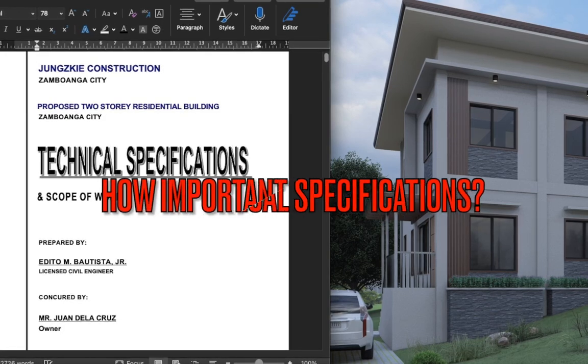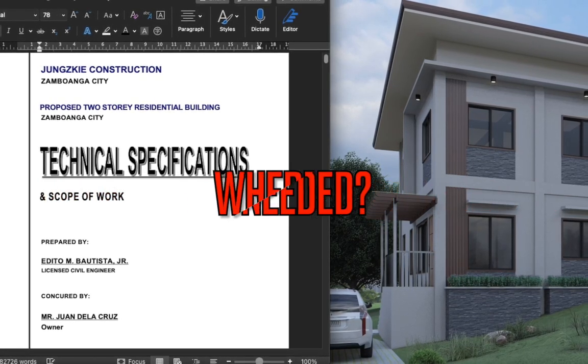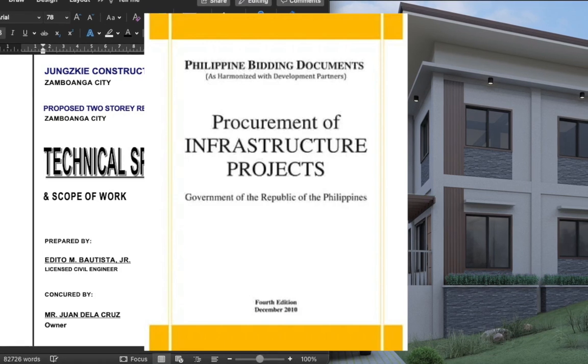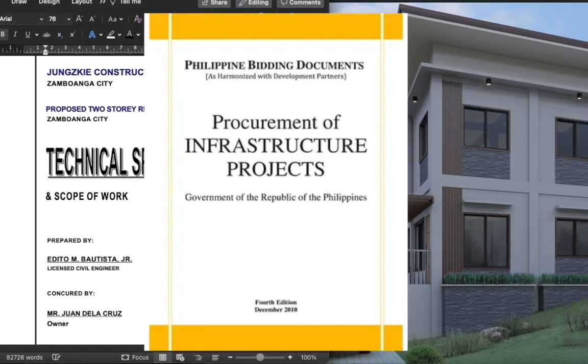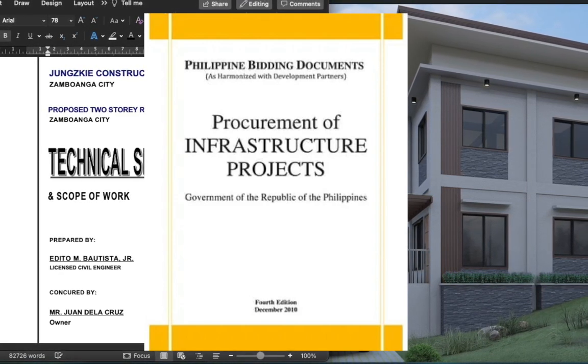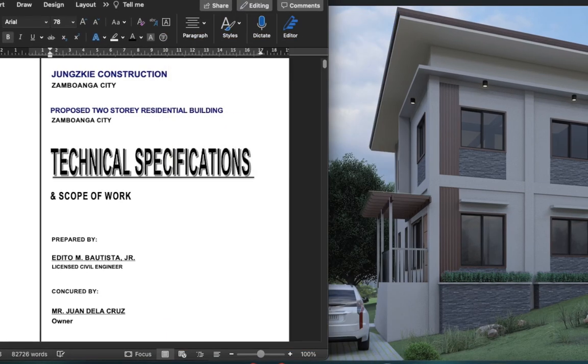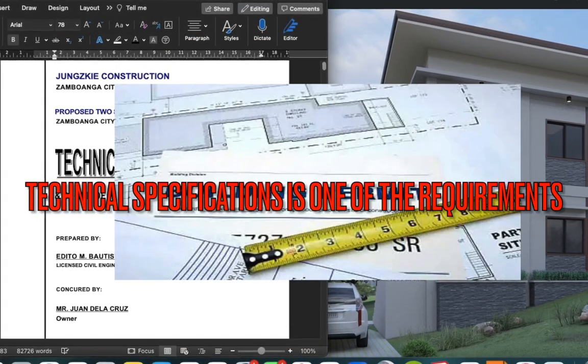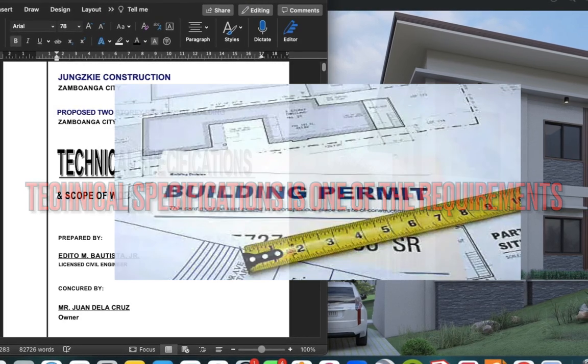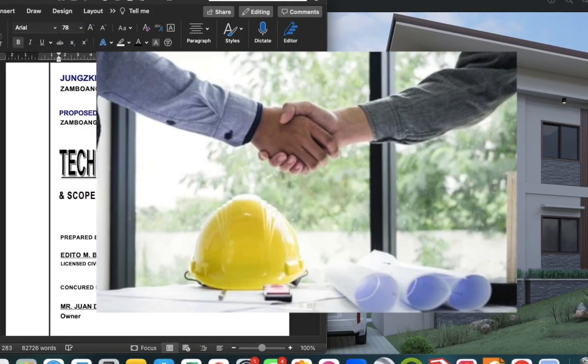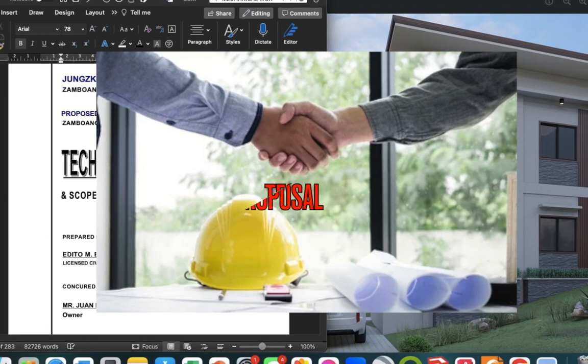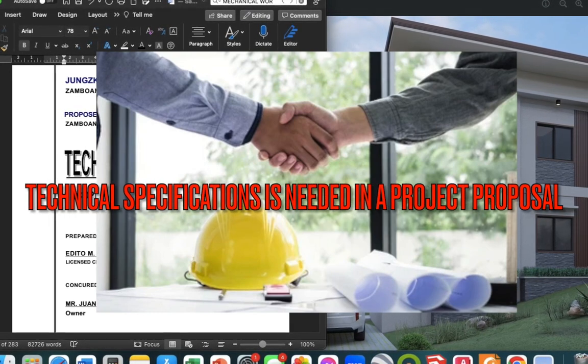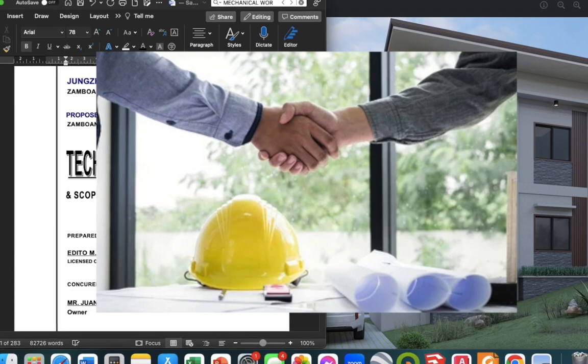How important is the technical specification and where is it needed? In government projects, a technical specification is one of the documents needed before a project can be bidded out in government procurement. In application for building permits, you need to submit the technical specifications together with the plan and cost estimate. In making or offering a project proposal, you will also need to submit a technical specification document to lay down all the specifications of your project.